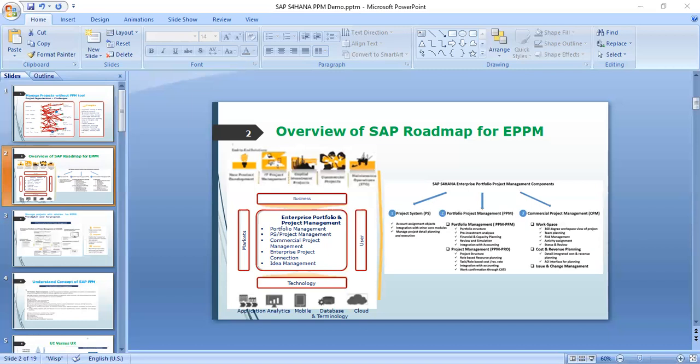According to that, you can also transfer whatever planning you have done under the portfolio levels. At the item level or initiative level, those financial plannings and the capacity planning you can also transport to the next level. It can be C projects or PS projects. Either you can fetch the data or you can transfer the data. Similarly, whatever actual cost or actual revenue you post, you can also see everything under the same dashboard. So these are the basic financial plannings, how you're going to do it in the system.